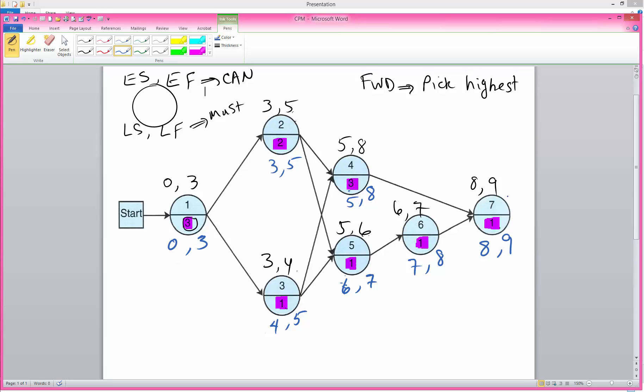So we have completed our forward and backward pass. Remember that in our backward pass we pick the lowest.